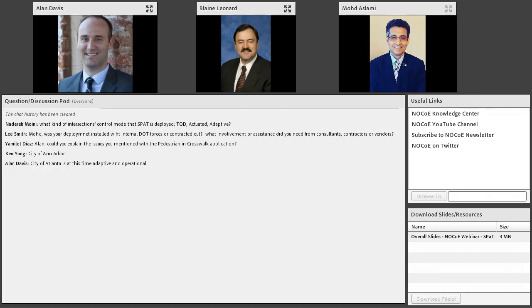Obviously, our town of Cary traffic management and traffic engineering staff helped with the networking side of the system. They opened up the VPN for the contractor to provide the communication from RSUs back to the web application for ETRAN, in assigning IP addresses and providing the VLAN for the RSUs and all of that. We didn't have a consultant in this project, but mainly the town of Cary IT folks helped with the networking side, and the contractor installed all the equipment. Thank you so much, Maud.